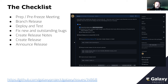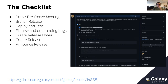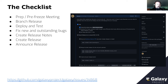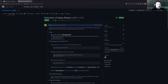The release flow starts with prep to set up issues, then a pre-freeze meeting kicks things off. We officially branch the release — that's the freeze — then deploy to various Galaxy servers, test along the way, fix new and outstanding bugs, create release notes, and finally create and announce the release. This issue is live right now; two of 60 tasks have been done, so there's a lot left for the 23.1 release.